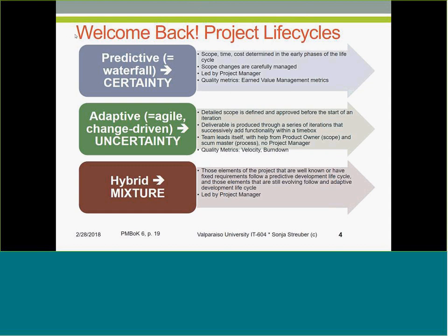Well, we have the waterfall life cycle, which typically is being used for smaller projects, and when we have absolute certainty that our scope is really not going to change very much, so we can nail that down at the beginning of the project. And we develop and then we deploy. And if it's a small project, if it's a version upgrade, things like that, not much new functionality going on, then waterfall is perfectly fine to use.